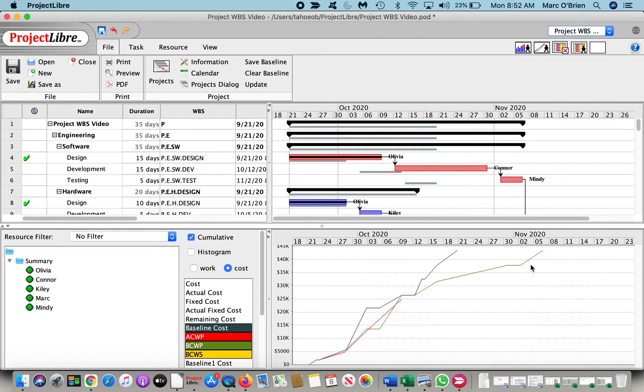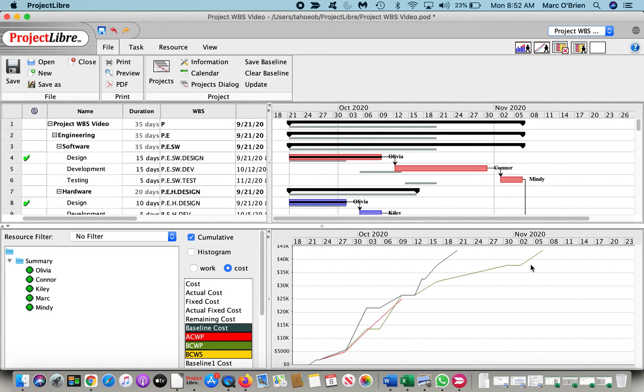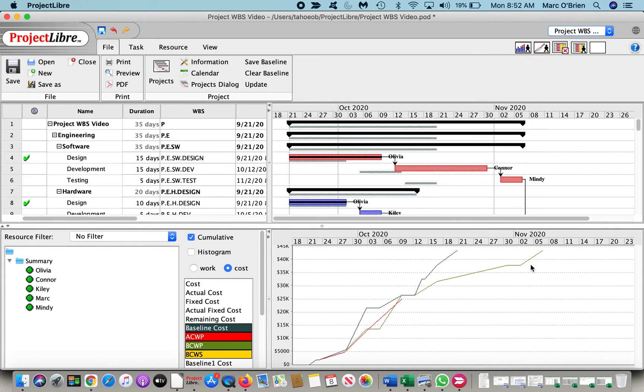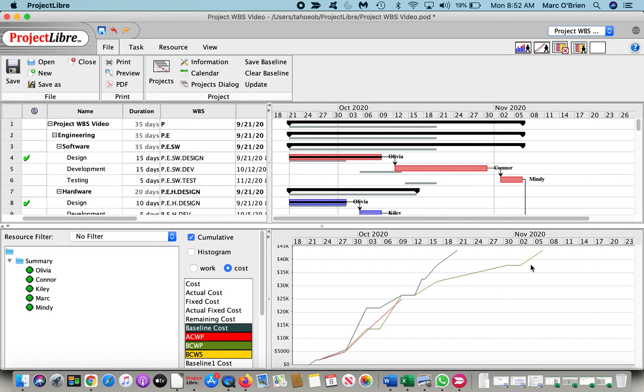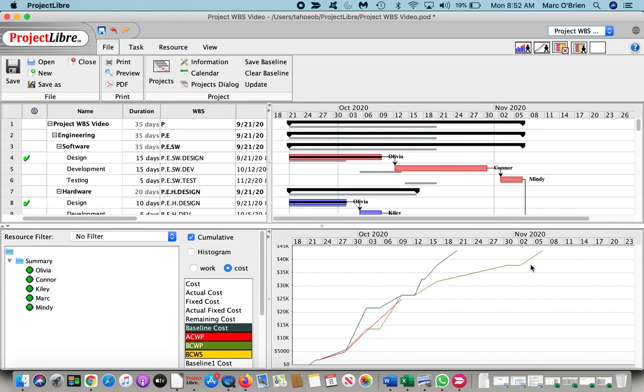So in summary, knowing your budget and percent complete is not a full view of project performance without understanding the context. 30% complete may be ahead of schedule or maybe well behind schedule, even though both may not actually be over budget since work hours may not have been performed, just delayed. It is a combination of baselining your project for a budget, setting a status date for where you are evaluating, and then ensuring percent complete is updated for tasks. Then you can understand the context of your project progress. There's a lot more to this, but wanted to cover it. ProjectLibre has a lot more to do in this area, and the cloud version is a multi-project solution, very useful for that. Viewing this information across all projects will allow overall management of your projects. However, for your desktop project, it's important to understand that you're real progress on the project, and this can help.